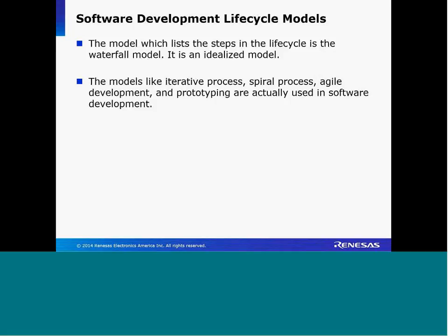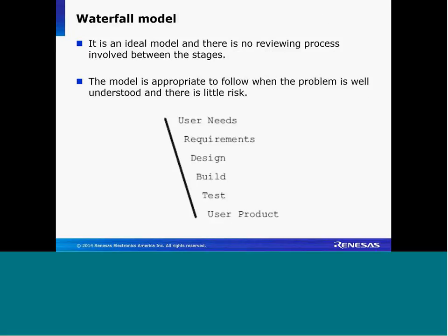There are development tools, or what we call lifecycle models. Just to introduce some of these quickly, this is where you do everything in order, once. You identify the user needs and requirements, you design, you build, you test, and you deliver the product. We also call this the Tada method, T-A-D-A, as we say in the world of magic, which is actually a bad way of developing a product. In this, you do everything after understanding what the user needs up front.